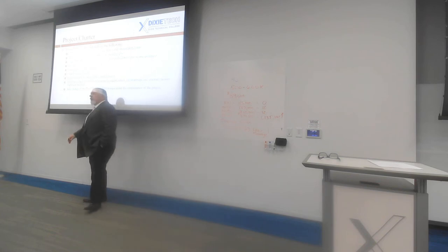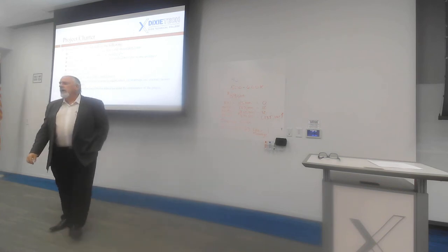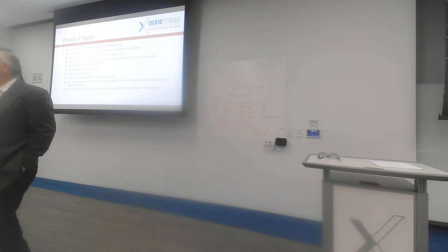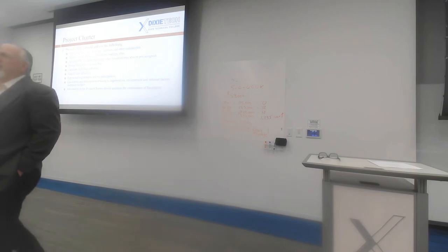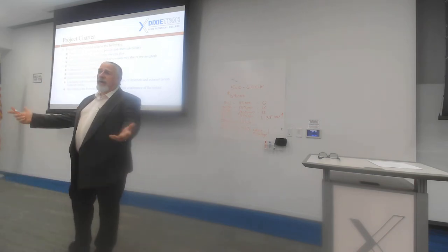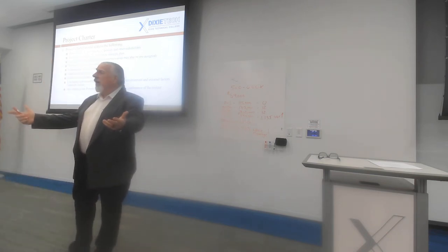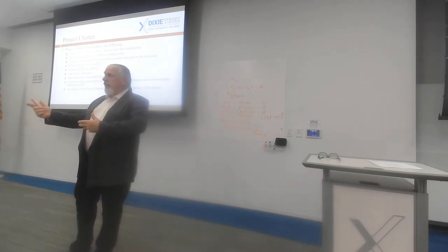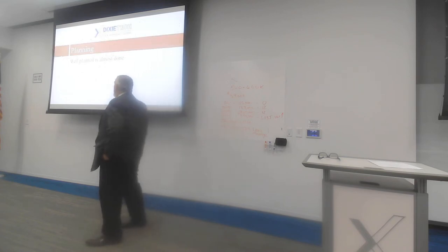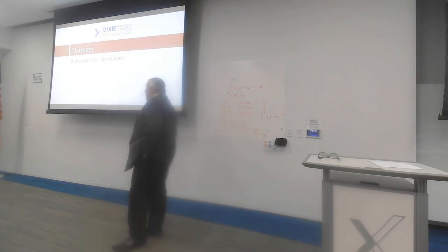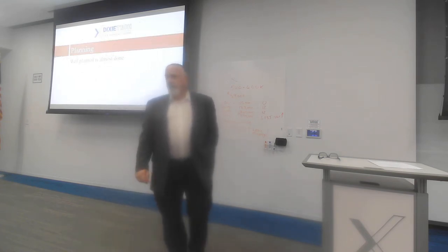Generally, project charters say that if there's a significant change, we reset the project charter. What that means is we reevaluate. Are we still funded okay? Are our milestones still in the right place? Because we had a change, and this change has a domino effect on the whole project. How is it impacting that? That needs to be discussed in the project charter.